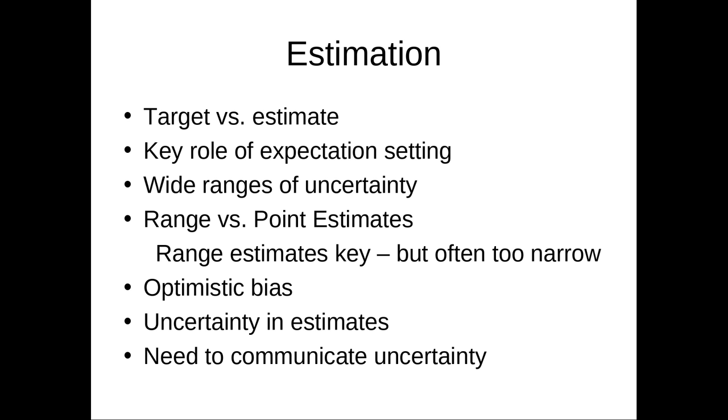An estimate will consider, okay, what needs to be done, how long do we think it's going to take, who's away during that time, how many developers do we have, what sorts of spike prototyping do we need, and what have you, okay? And an estimate shouldn't be a promise either. It shouldn't be taken as a guarantee or what have you.